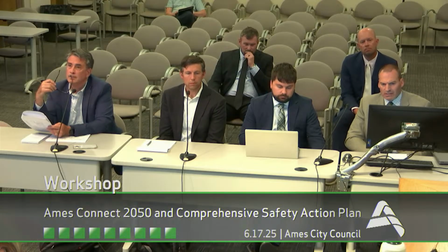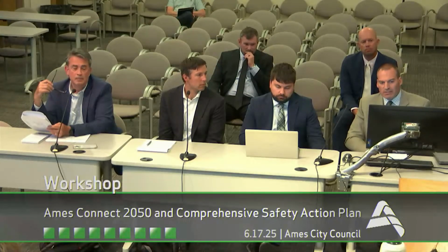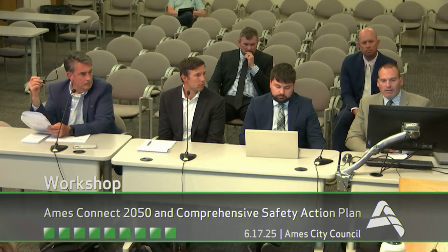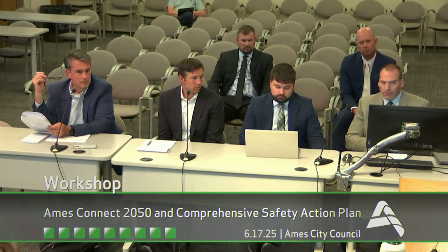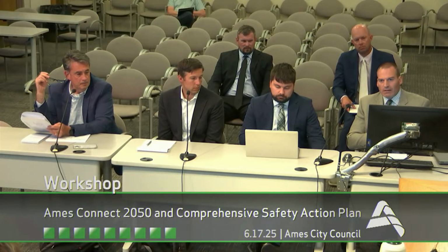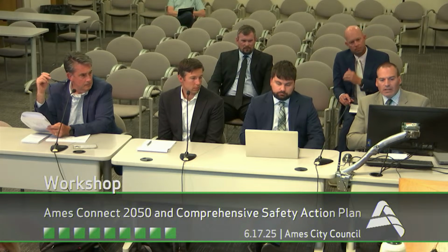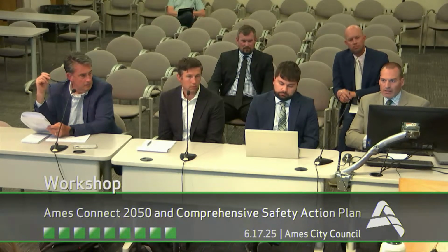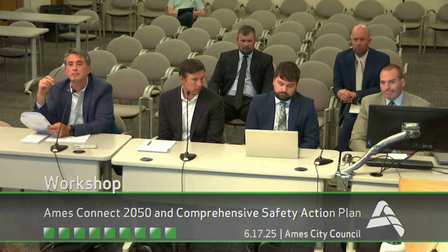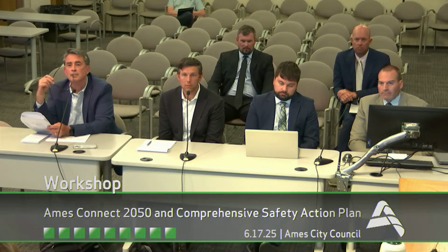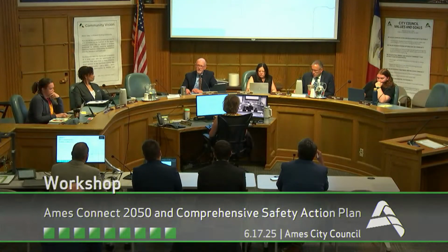And especially, again, I feel like we're kind of hammering this home, but to program those limited dollars in the best way that we can. Yeah. And that's where a lot of things about federal aid, as you know, get complicated if you don't have right of way, if you don't have other things. So we try to consolidate projects into areas that don't require complicated federal processes when we go to do project lettings. Well, for me, that's very helpful to hear you say that you have confidence this is reflecting what you think the needs are. That's an important factor that would affect my decision or vote.